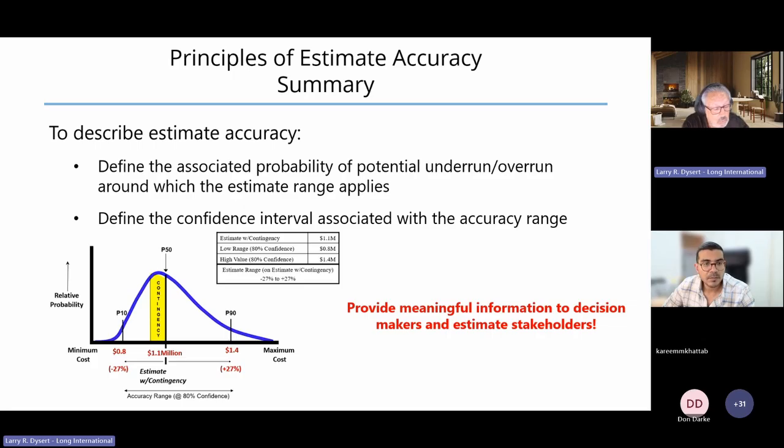Now, we need to be careful when we run QRA methods that use Monte Carlo simulation. We should be inputting only the most critical risk drivers into our model. The more elements you enter into a Monte Carlo simulation, the central limit theorem kicks in, and if we have 1,000 elements, it's going to tighten around the mean of the distribution, much more so than if we had only identified the 15 or 20 most critical drivers of risk.